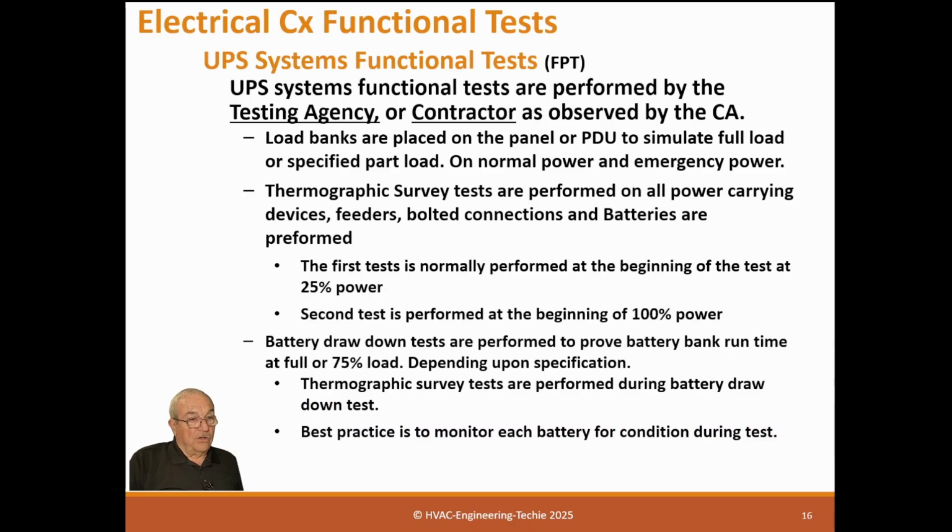So it watches all those parameters, and they bring that data into a temporary SCADA panel and then to a computer so they can data log all that power. And that will actually tell you, if you don't do this, which a lot of people don't have this capability, then basically you're depending on the thermal survey to tell you you've got a bad battery in the system. So that's kind of a problem.